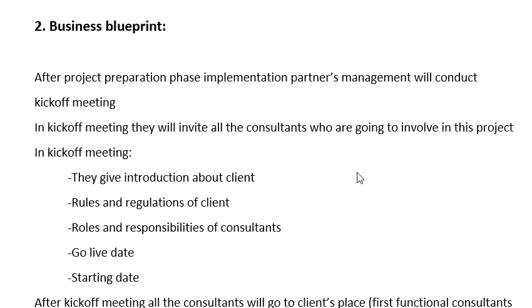The next phase in the SAP methodology is the business blueprint. After the project preparation phase, the implementation partner's management will conduct a kickoff meeting. Here, for example, we have taken Infosys; the Infosys management team will conduct the kickoff meeting. I'm taking only an example. Kickoff means starting. In the kickoff meeting, they will invite all the consultants who are going to be involved in the project.